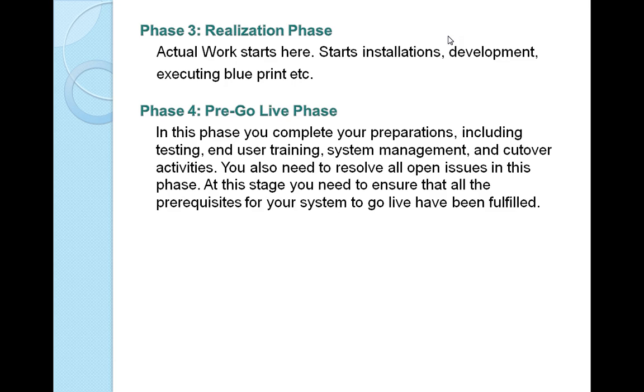And you also need to resolve all open issues in this phase. When you are performing the testing, you may face some issues, right? So you need to resolve all open issues in this phase. At this stage, you need to ensure that all the prerequisites for your system to go live have been fulfilled. If everything is satisfied, if everything is okay, then only we'll move to the fifth phase.